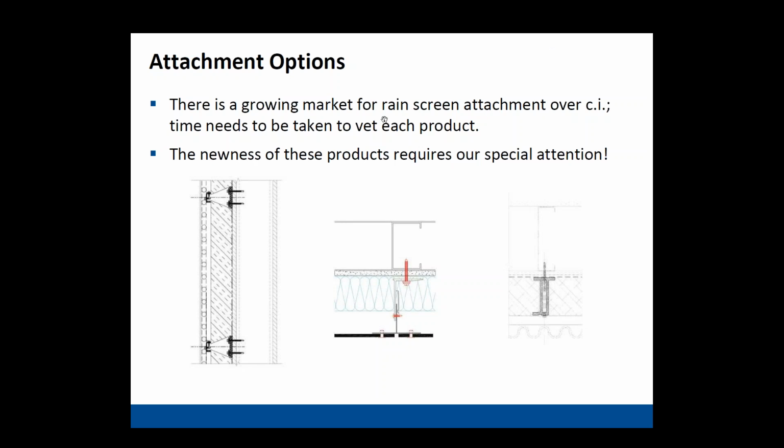We like to see it when the general contractor wants to put this in our package rather than separating it into two different scopes of work, meaning having possibly a drywall guy handle all the outboard insulation and the girts or whatnot behind it, because they seem to not take as great a care with it as the wall panel guy does. So it's definitely new for us, but we're fast learners.